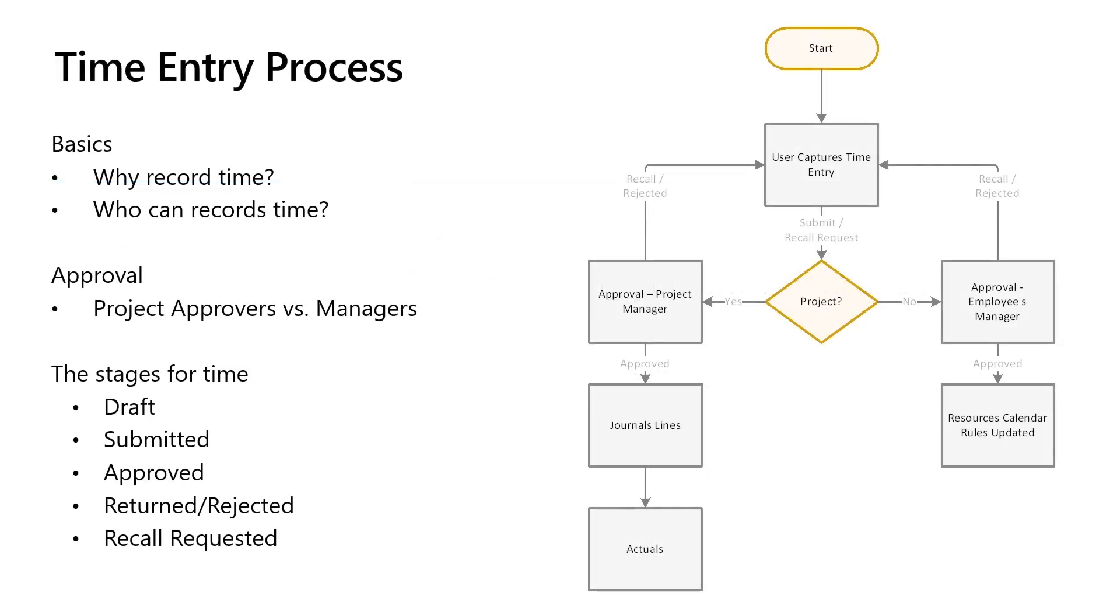The time entry process. Who records time? Within Project Operations, time is recorded by any bookable resource. That time flows through our system and drives the cost and sales price figures that ultimately result in an invoice being created.